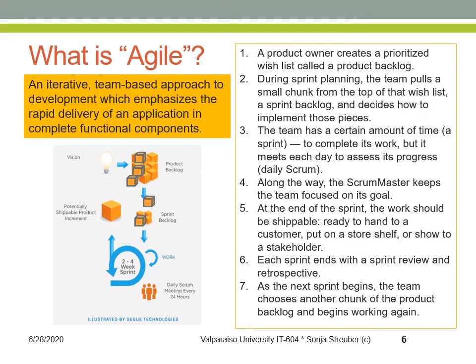These selected user stories then go into the sprint backlog. And then, every morning, the development team meets in front of a whiteboard in a 15-minute stand-up meeting, in which each member answers 3 questions. What did you do yesterday? What are you going to do today? What help do you need to get your work done successfully?